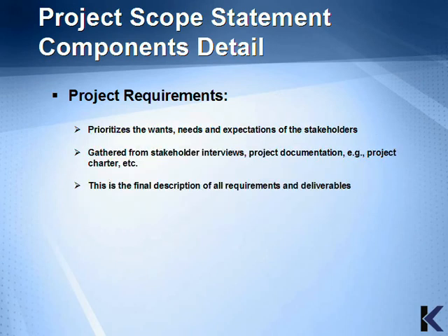The requirements should also prioritize the wants, needs, and expectations of the stakeholders, and these are gathered from the stakeholder interviews and project documentation, such as the project charter. And this is the final description of all requirements and deliverables to be produced. Anything that surfaces after scope sign-off is a change request.